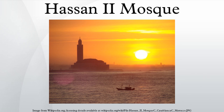In the second phase, the voids seen in the prayer hall were filled with concrete. In the third phase, the structural slabs and pillars on the exterior part of the mosque exposed to the sea were demolished. 6,000 cubic meters of concrete was removed. In the fourth phase, new exterior protection works were built using high-strength concrete with 2205 stainless steel rods as reinforcements for effective erosion control.